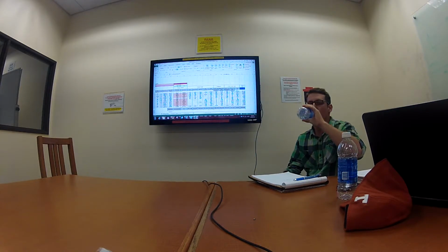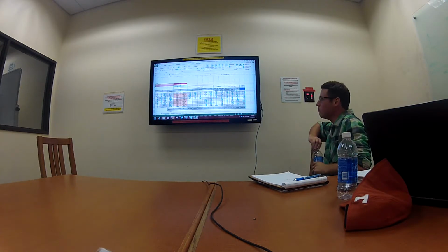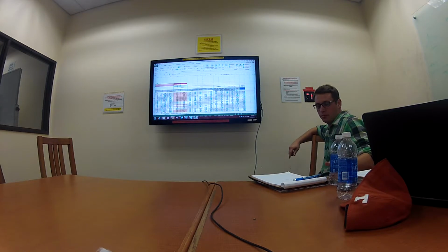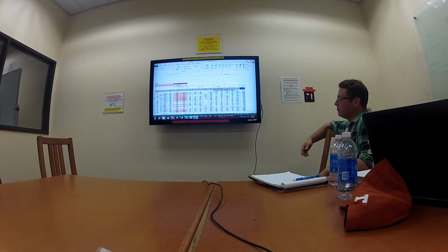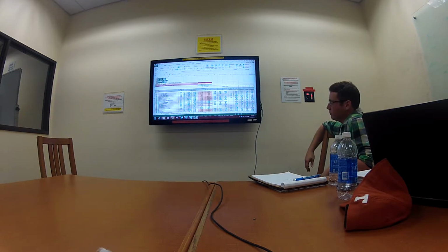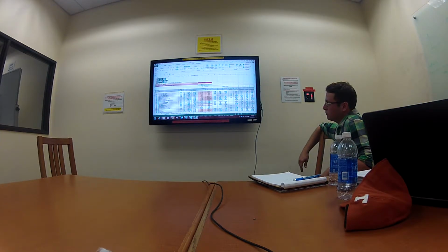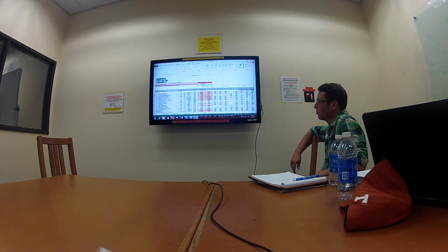The next point I want to make is we'll look at the orange columns and the two columns to the left. Click on the extended price. It takes that number from all the way over on the right side, and then it divides it by the units to get our unit price. So that's what all of the numbers that we plugged in are telling us our bid price should be.